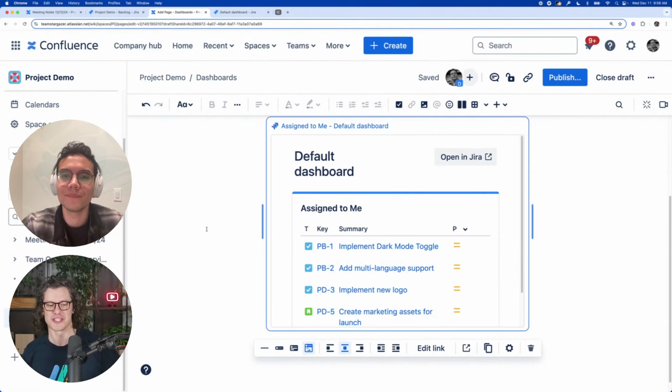A great point from Christian in the chat about the release notes. The release notes are only going to be as good as the information in Jira. So yeah, you do want all your stakeholders to put their content in Jira so that those release notes are good. That's not a tool problem, that's a process problem. And a lot of our teams face that, right? So that's a great point, Christian. Even with AI, it's not going to be able to make up for the fact that we're not putting all the information in the Jira issue. So do that, people. Very important.